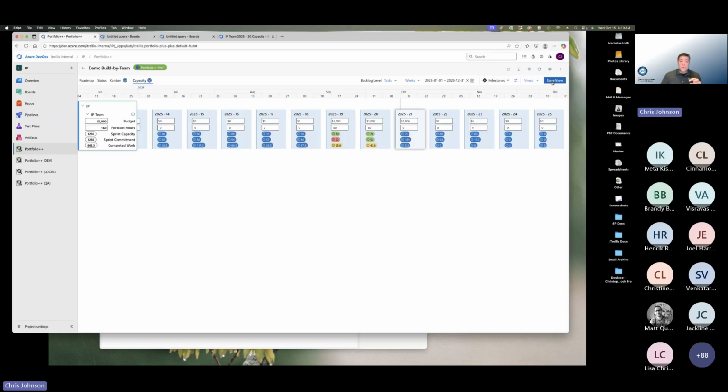And so if you want to do what if analysis, like I've got a really rich plan where I've got a lot of time and it costs a lot of money, and then I've got the bare bones minimum plan that I'm just doing the bare minimum of what I think I need to do and try to keep costs down, I can have a max and a min view. And the values that I'm putting in would be stored with each of those plans. So I could have one roadmap and multiple views of what that plan looks like for what if analysis purposes.